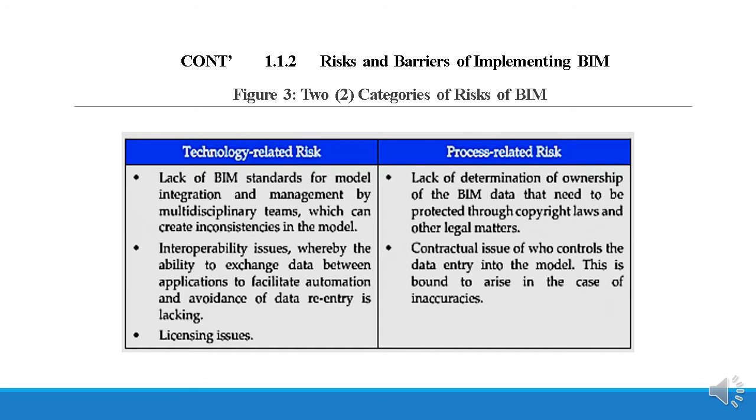And second category of risk of BIM, process-related risk. Lack of determination of ownership of the BIM data that need to be protected through copyright laws and other legal matters. And contractual issues of who controls the data entry into the model. This is bound to arise in the case of inaccuracies.